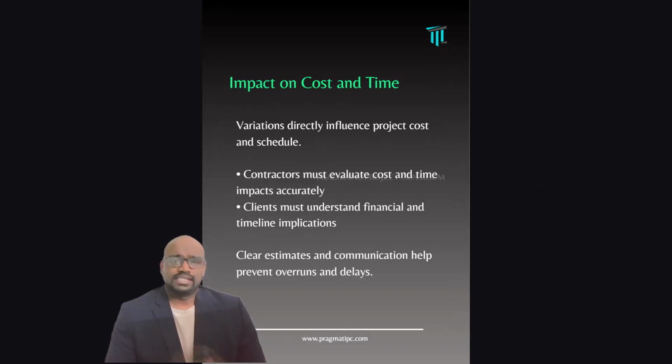They never see the impact of a variation claim on time. If there is an impact of this variation claim on the critical path, it affects your project completion date, then it goes to a delay or it ends up in an EOT. So I think variation has to be linked with the EOT in most cases.